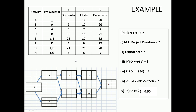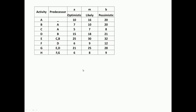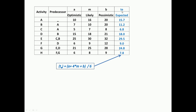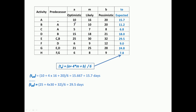What we have done here is put up the network. The activity predecessor relationship is used to build the network. We then go on to the next step in PERT, which is to calculate the expected value. Using the formula, I have calculated the values in this column. For example, for activity A: 10 plus 4 times 16 plus 20, divided by 6, gives me 15.7, which is the expected value. Similarly, for activity E: 25 plus 4 times 30 plus 32 gives you 29.5. We calculate the expected duration similarly for all other activities.